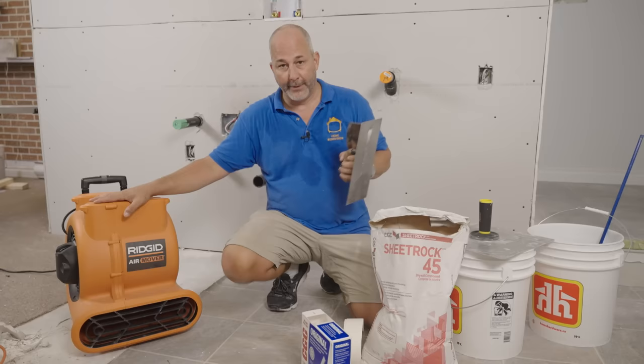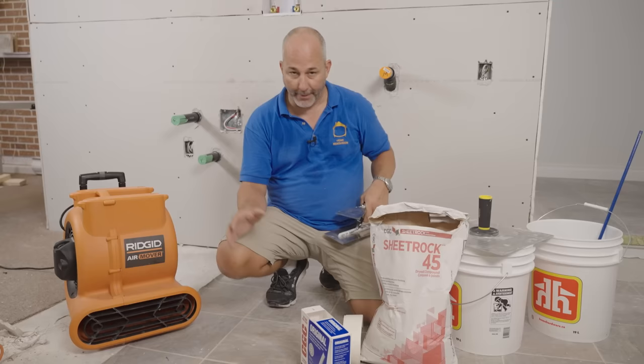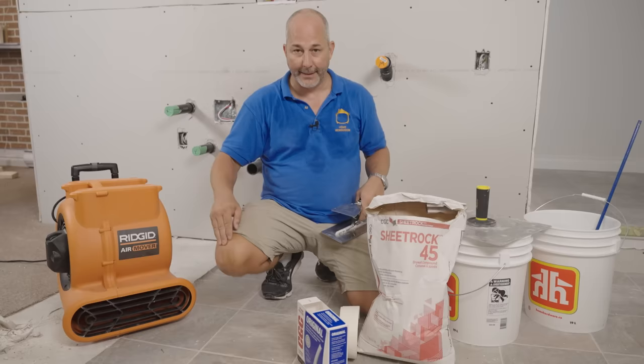And I'm using air moving. Lots of air movement. It is hot and humid today. This is not an air-conditioned environment. It's gonna actually slow me down, probably almost an hour in total, just because it takes so much time to get the moisture out of all of this when the air is so wet already. So hopefully we can still pull this off.